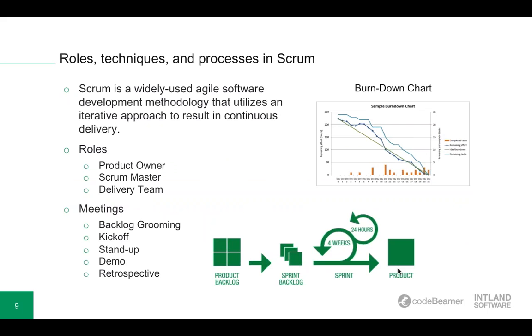Scrum. In Scrum, the process is broken up into much smaller pieces than in Waterfall, for example, making it much easier to implement changes and corrections if they arise. First of all, you plan only enough for you to get started with, building the minimal feature set. And then you build what was planned and gather feedback from your customer or end user to make sure that the end product perfectly suits their needs. You will then test and review that small feature set and get it ready for delivery.